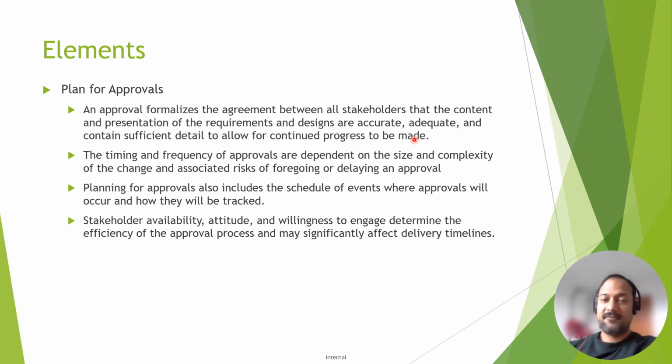Even if thereafter the consensus is still pending, then the business analyst notes down the risk in the risk register that one of the stakeholders is not agreed. So he also puts there what are the risks if that stakeholder is not in line with us.